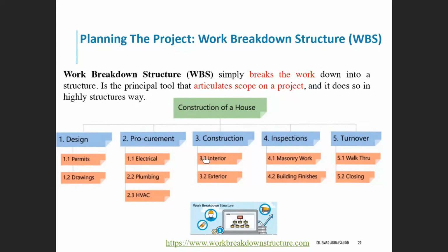So the way you do it here will also help you later in the scheduling. You start thinking about the activities needed to be done before others, and you start putting the sequence on the dependencies of the activities in the next phase or the next activity level.